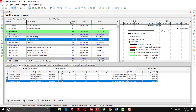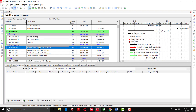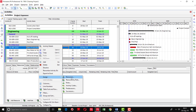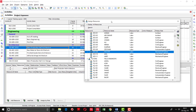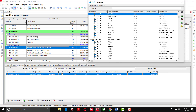I will tell you another way of assigning resources to the activity. I am going to select the engineering architecture activity of main production. Previously I told you that you can see the resource tab at the bottom. Another way is to just right-click, go to the assign option, and select resource. The same window will appear. For example, we are going to select Ahmad for this activity. By default 350 units are coming from multiplying 44 by 8. I am going to modify this — this person is going to work for 300 hours, so I am changing 352 to 300. Then I select the cost account: design engineer.